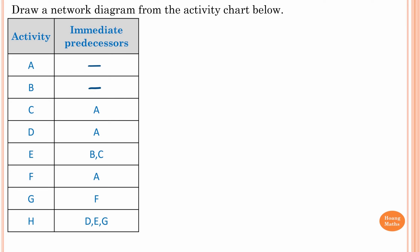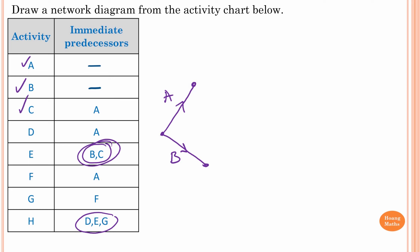Before drawing the network for this activity chart, note that activity B and C are joined together, as are activities D, E, and G. Activity A and B have no immediate predecessors, so I draw activity A here and activity B here. For activity C, B and C join together because A is an immediate predecessor of C, so we connect here — this is activity C. For activity D, A is an immediate predecessor, so we start from here and draw D.